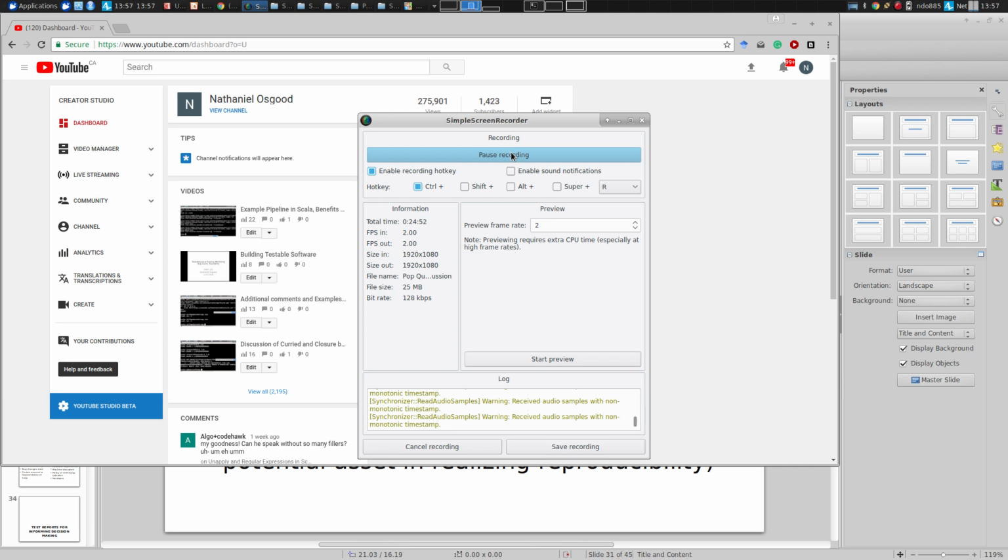So when we're dealing with these situations, it's all about opportunity costs. It's all about triaging. It's about taking our limited amount of time and energy, human resources, and using it to greatest effect. That's what it's about. It's about taking what we have and making as best use of it as we can. And that requires us to be judicious. It requires us to be thoughtful about what we're doing, to test the things that are most worthwhile, to prioritize the risk management on things to which we're most exposed, where risk exposure combines probability and severity if it happens.